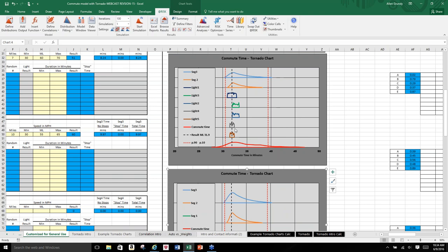You can see here how I defined what the result of the most likely or the deterministic most likely is. I said that traffic light 3, it's 80% chance, yeah, most likely you're going to get stopped at that. I had a choice of doing the 3 and the 2 or the 4 and the 5. I chose the 4 and the 5. So if you can see with this uniform distribution, if you get stopped at 3 or 2 or you at the same time, since those are dependent, most likely you're not stopped, but it is going to make your travel time worse if you are stopped. So that's why there's a shift in those. So again, you need to be able to explain those, why they're that way.